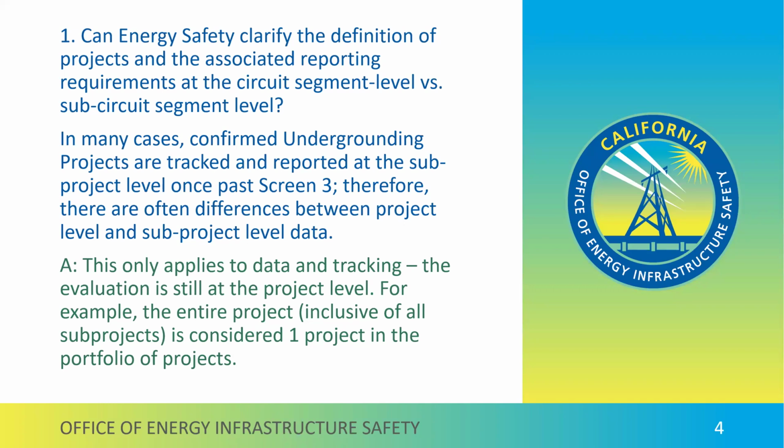But as we actually do the work in the field and even make decisions around mitigations, we do break a CPZ into sub-projects. So we will break that segment into smaller pieces to accomplish the work. Does that address the question that was posed? Yeah, and the second half of my question was, so is a sub-circuit the same as a sub-project?